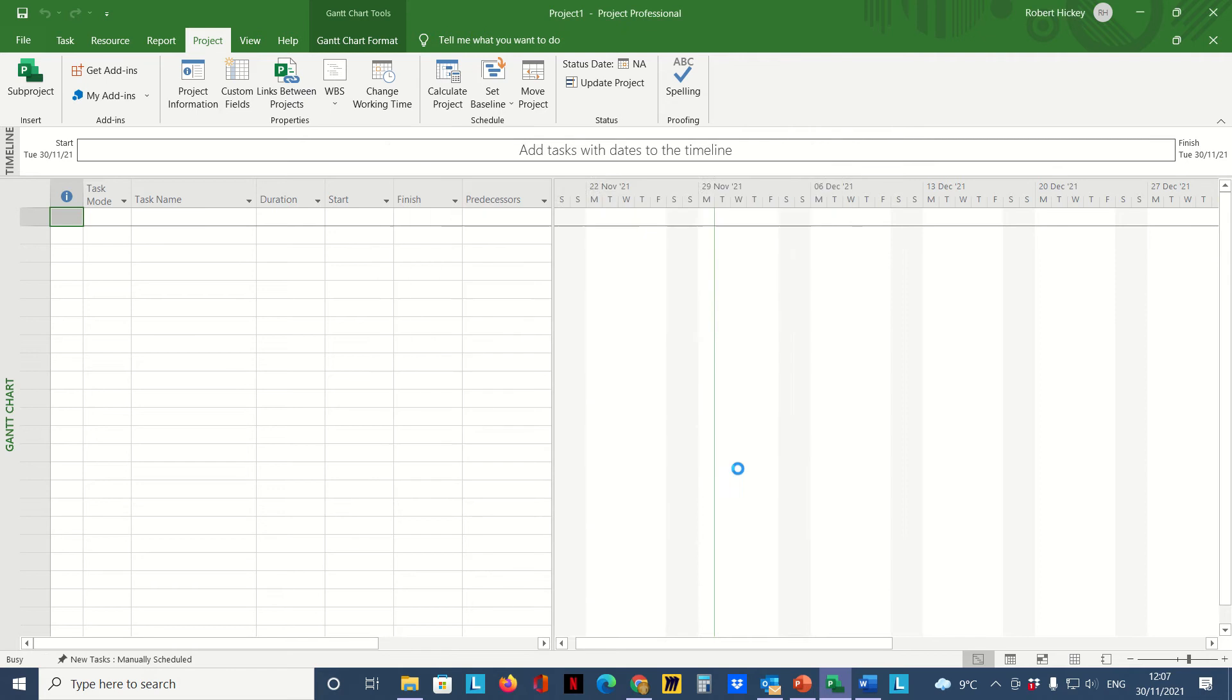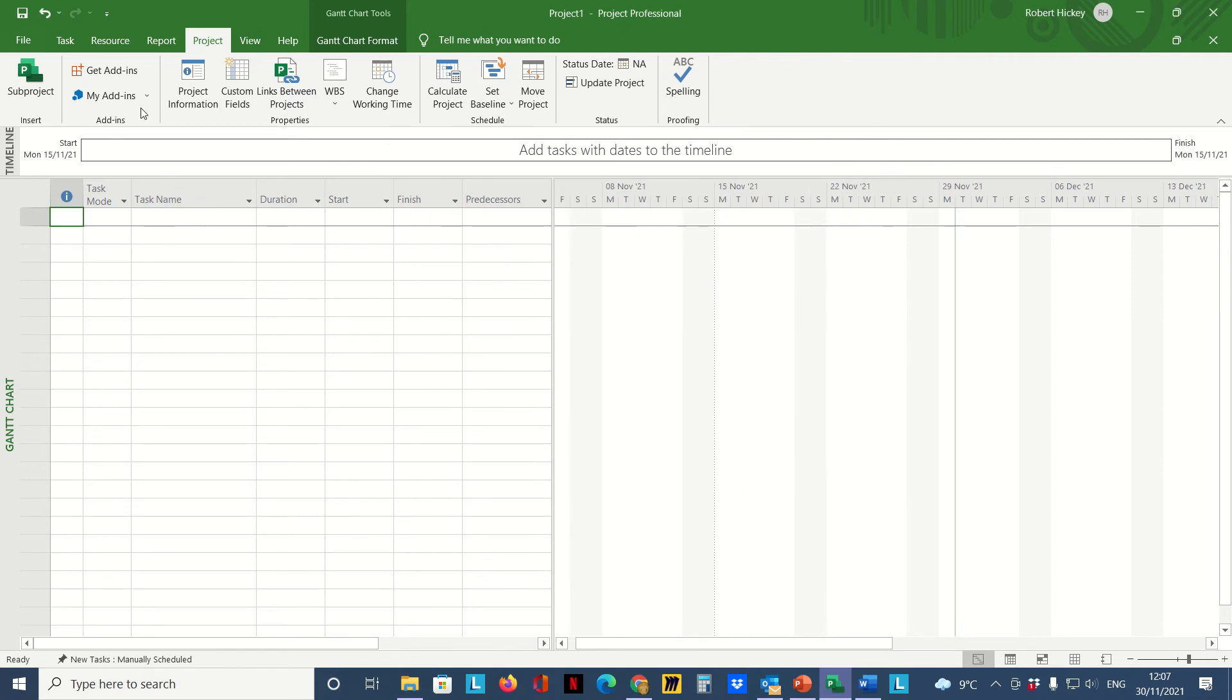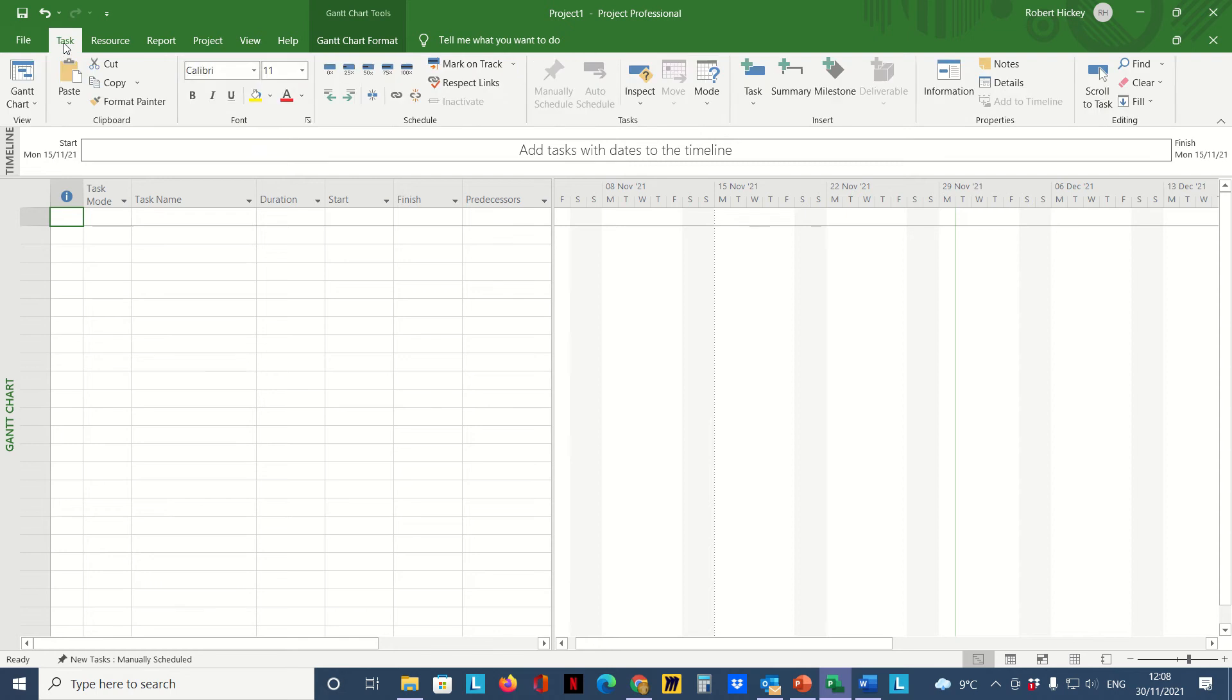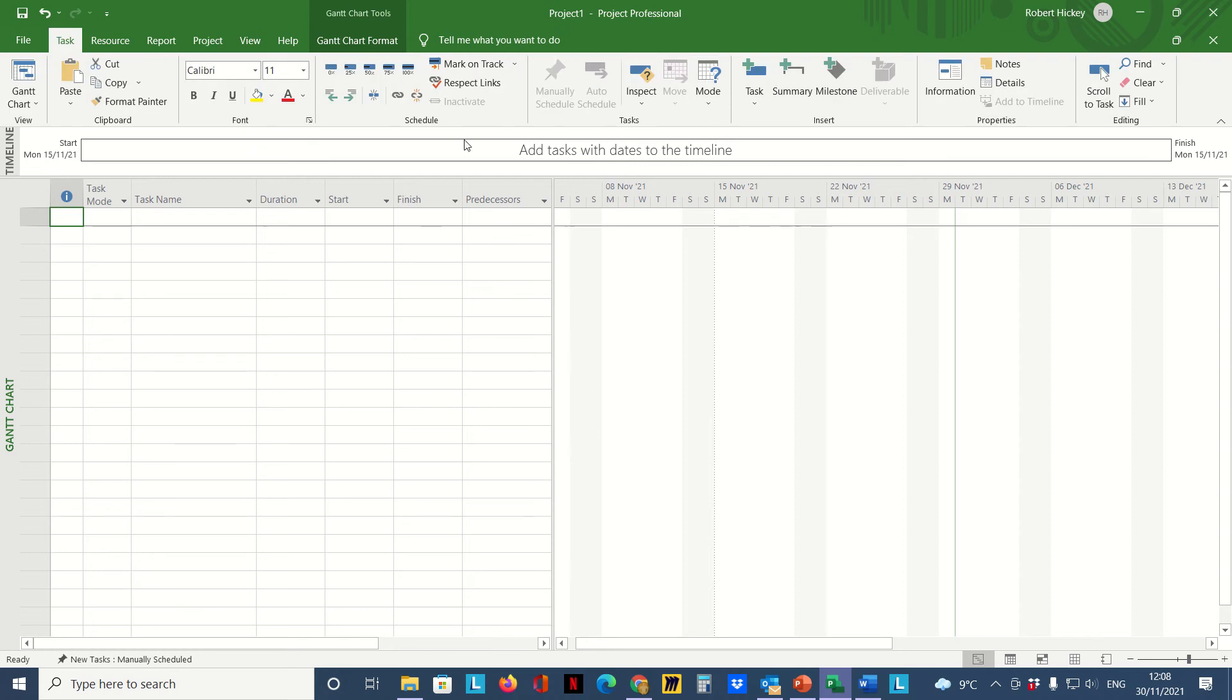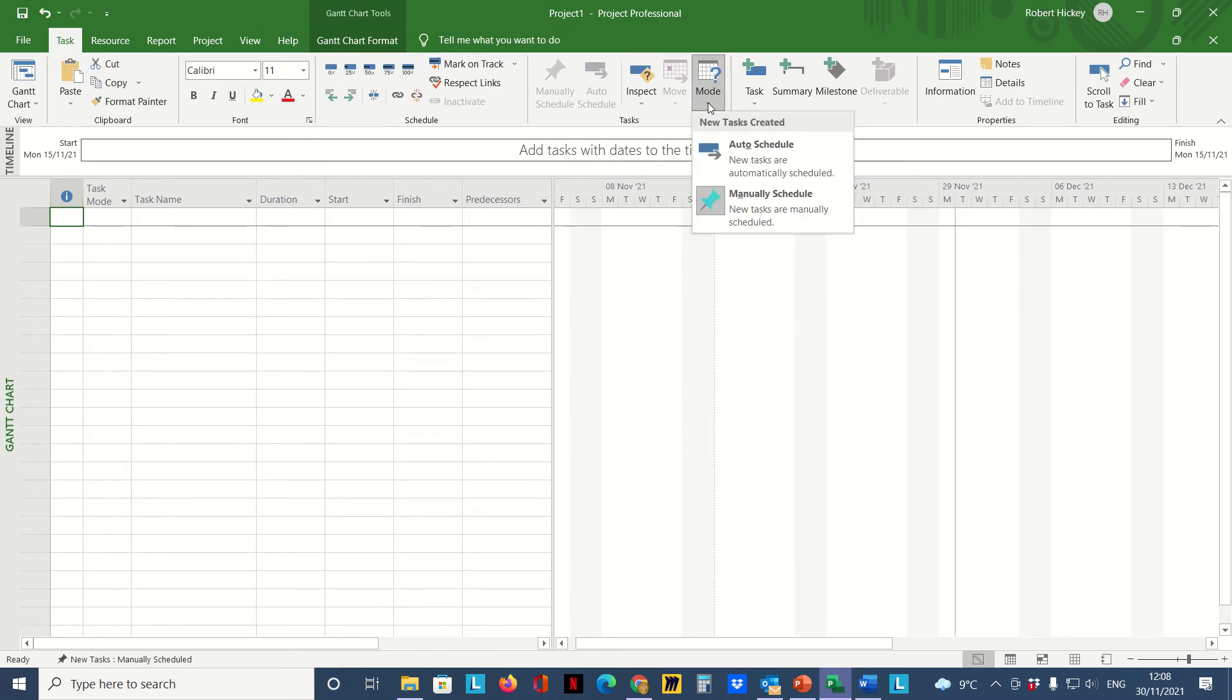Now the next thing we do is set the task mode. We go to the Task tab and over here in the Task group we click on the drop-down from mode and we're going to select Auto Schedule.